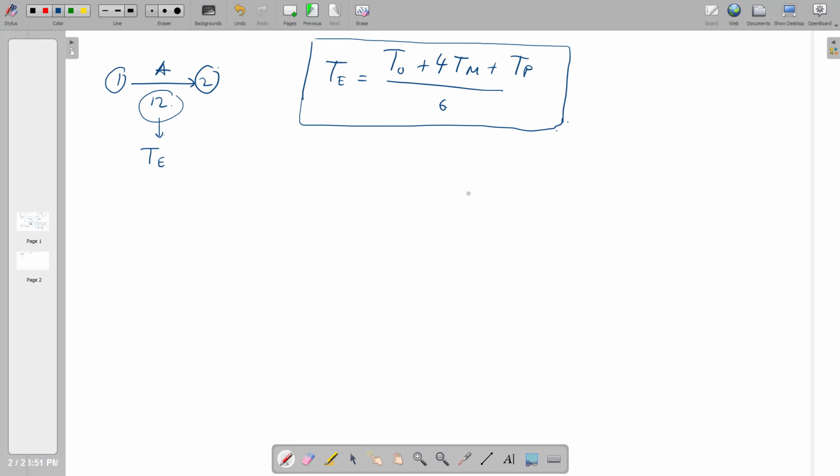Right. Now the time taken by the activity in a project usually follows a distribution. There is a standard deviation of 1/6 of the range. So when we have the standard deviation for the project, you do remember that TO is smaller than TM, and then this one will be TP.